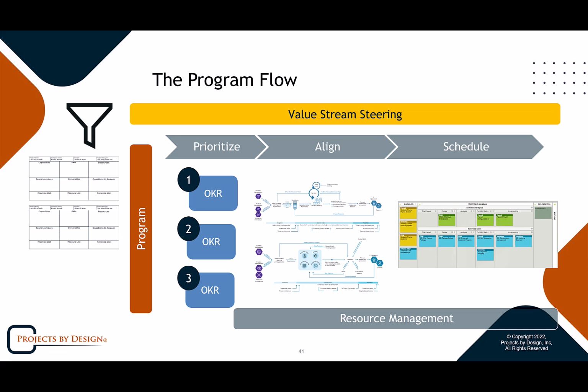From now on in the course, I'm not going to refer to MMP because there's an overlap with the concept of MBI, minimum business increment. Minimum business increment is the smallest batch of items for which you can specifically describe the value. The reason I would call out MBI over MMP is that an MBI could be one feature.